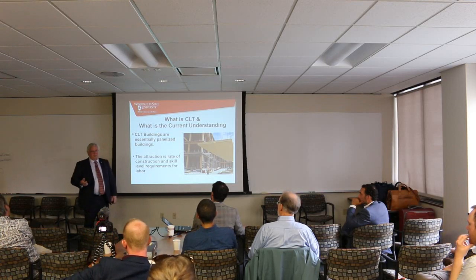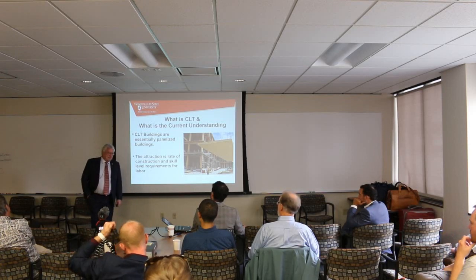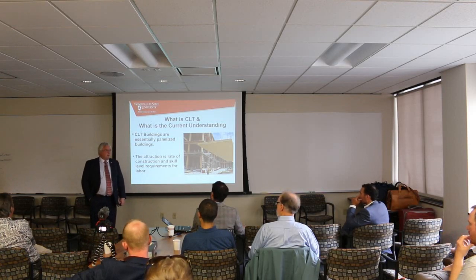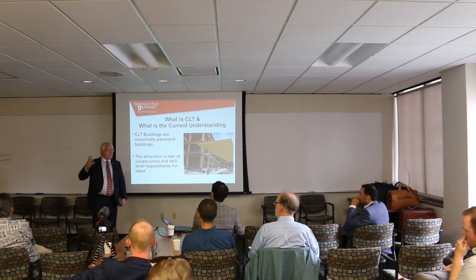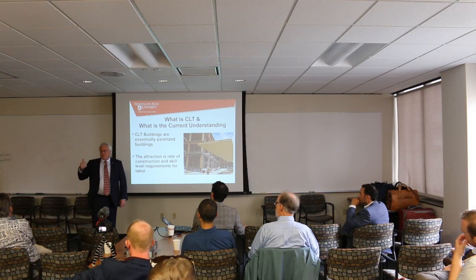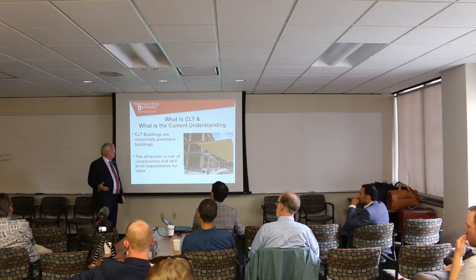And so the first time that Lend-Lease went and built that hotel down in Alabama, their crew were four Iraqi vets who had never done construction before and a crane operator. Taught them how to do it in 4 hours and put that building up in 4 weeks. Okay, that's really what's going on.